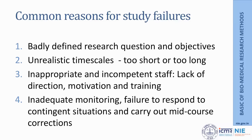Often it happens that studies fail. Why do studies fail? It is because either there are badly defined research questions, or objectives are not correctly defined. The time scales decided are either too short or too long. Sometimes the staff is inappropriate or incompetent — this might be because of lack of correct direction, lack of motivation, or lack of training. Or sometimes everything else is right, but there is no adequate monitoring and there is failure to respond to contingent situations and carry out mid-course corrections.